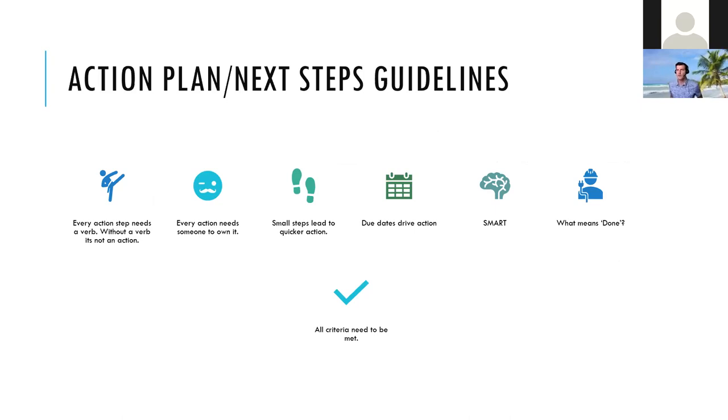Everything that we do, where there is an action item, we know that somebody is responsible for it, and that it's clearly stated. If we are doing an action, write that action. A solution like "writing down the releasing process" is no solution. Is it there or not? Does it need a change? Does it need implementation? I don't know what release process means. It needs to be self-obvious. Every action needs to be described with a verb. That's the whole idea of action items.